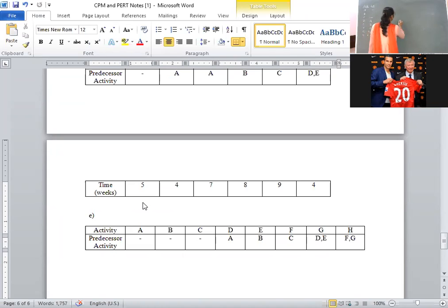What I told, every time the node always starts with one. Node is always mentioned in a circle. Starting node 1. Here 3 activities don't have any preceding activities: A, B, C. A doesn't have any preceding activity, B also doesn't, C also doesn't. Right now, don't close those activities.